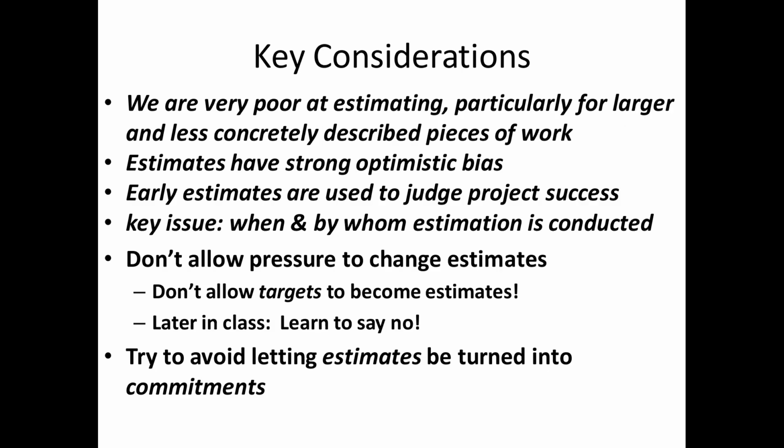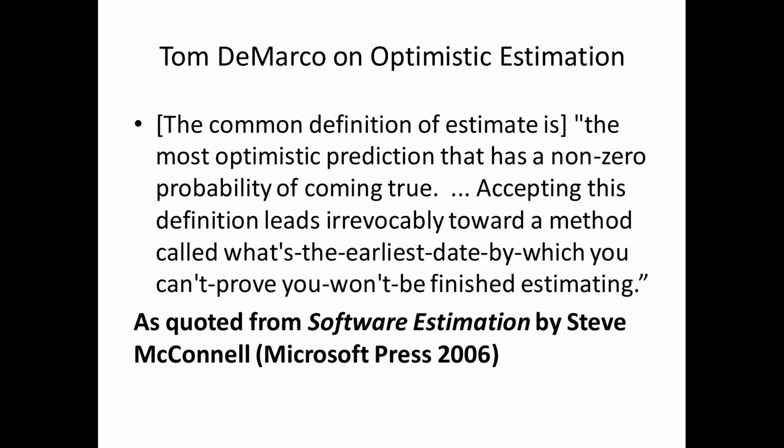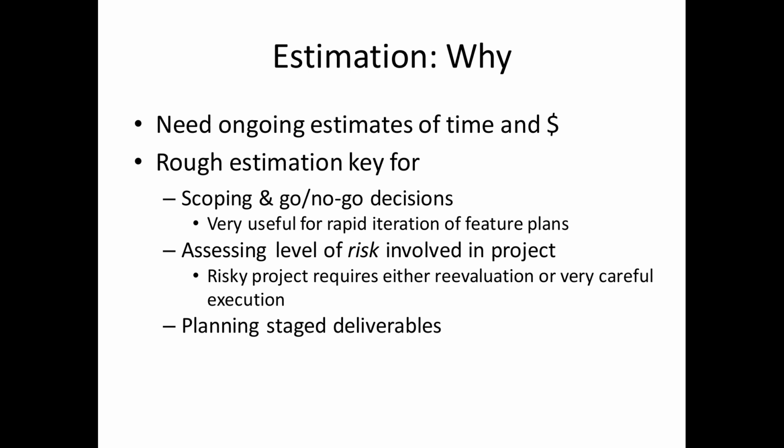So estimation is a process which takes place at several points and at different levels of granularity. And what I'm asking for your projects is that you estimate at the level of particular tasks how long they will take, and you compare that against how long they actually take, as judged by recorded time.